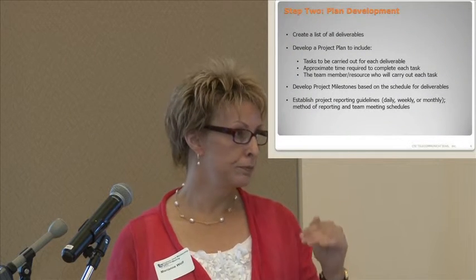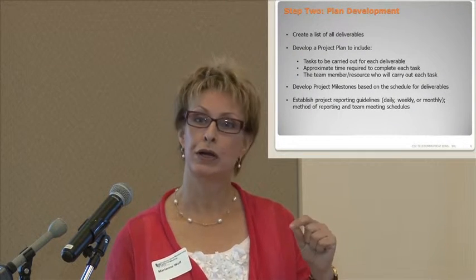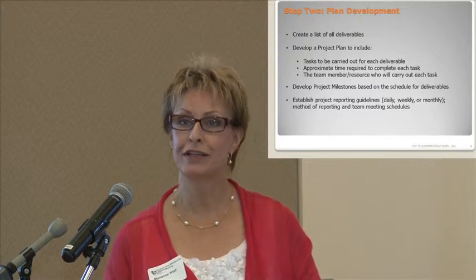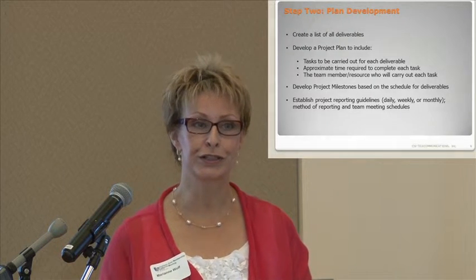You're going to use that to develop what your milestones are. And milestones are really great points in the process to retouch base with your stakeholders, just to reevaluate the plan to ensure that we're all still on the same track and that the goals and the objectives are still consistent.